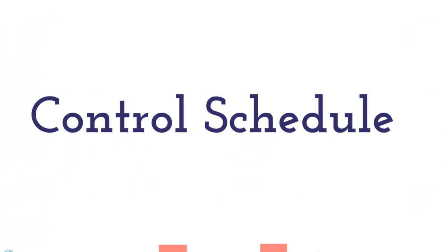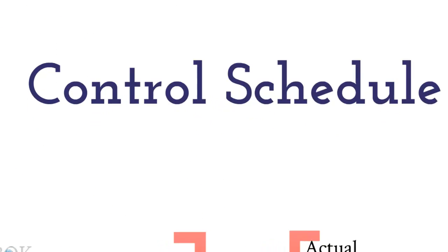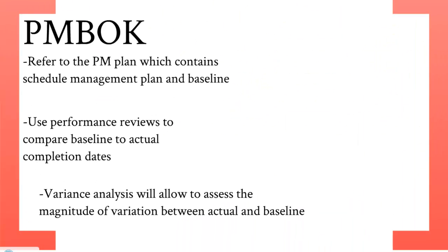Hello, everybody. My name is Bobby. I'm going to talk about controlling the schedule. The PMBOK states you must refer to the project management plan, which contains scheduled management plan and baseline. Use performance reviews to compare baseline to actual completion dates. Use a variance analysis, which will allow to assess the magnitude of variation between actual and baseline.